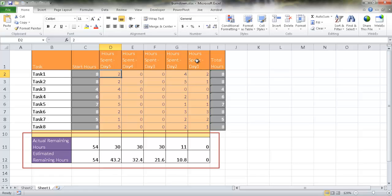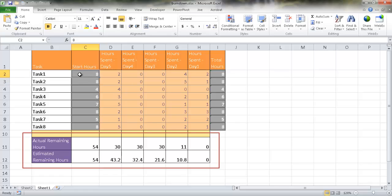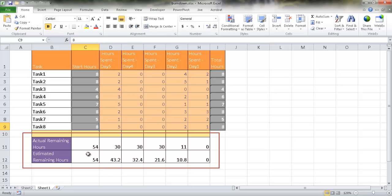So these are a series of tasks that have to be completed within five days. And through some estimation, we are allocating certain hours to complete these tasks. So task one is going to take eight hours. Task two is also going to take eight hours, all the way up to task eight where it takes eight hours. So we have to add those up and those will give us our estimated hours. This is basically the sum of our eight tasks here.